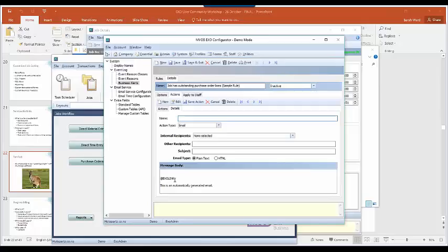As I say, we've got a report I run that does that. And the other thing is that we use the status, staff of the branches can put a job as completed. Yes. So I'm the only one that can archive it. So when I go through and look at all the jobs that are completed, I'll make sure everything's allocated off, that it's billed fully, that we've been paid, that the WIP's been, all those little bits and pieces, the passwords as I call it, and then I'll archive it. And once it's archived, no one other than I can. Yeah. I've got the initial JC for a reason. JC, job costing, Jesus Christ.